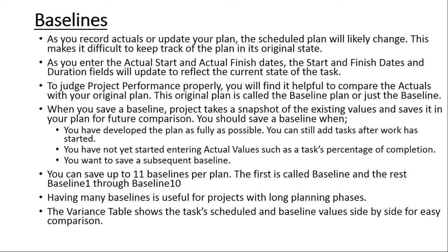Once you start entering the actual values, there is a variance table which can show you for each task the scheduled value versus the baseline values. So it shows them side by side for easy comparison. What we are going to do now is to go and save the first baseline in our project plan.